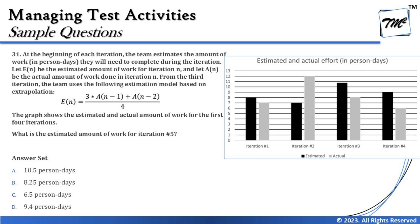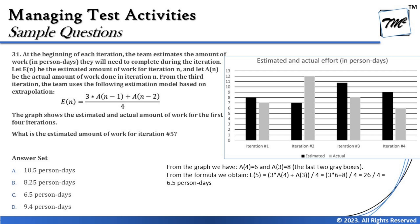Extrapolation is an estimation technique used in agile development models to do estimation based on completed sprints. We don't have a predefined reference, so as we start the project we use completed sprint estimated-versus-actual data to determine how much work to be done for the next sprint. The formula divides by four because four iterations have been completed so far. From the graph, A(4) = 6 and A(3) = 8, read from the gray bars on the chart.